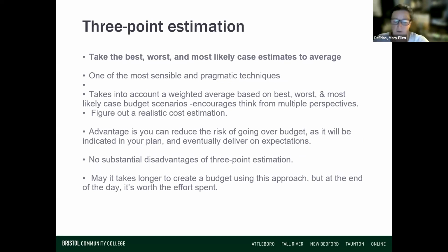You know what your best case scenario costs are, you know what your worst case scenario costs are, you know what your average project costs you. So you take out your weighted average, and this gives you a realistic cost estimation.